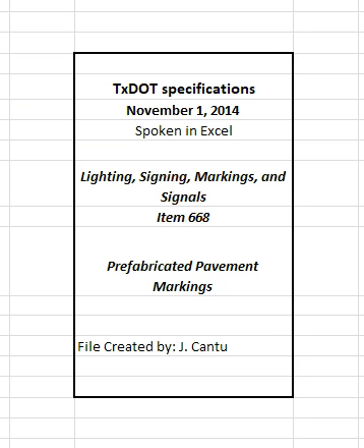4. Measurement. This item will be measured by the foot or by each word, shape, or symbol. This is a plans quantity measurement item. The quantity to be paid is the quantity shown in the proposal, unless modified by Article 9.2, Plans quantity measurement. Additional measurements or calculations will be made if adjustments of quantities are required.